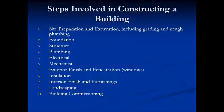Your electrical would be installed — meaning the wiring, the panels, etc. The mechanical systems, such as your heating and cooling. Then, after these, the exterior sheathing of the building — meaning the plywood or whatever is going to be used for the outside of the structure. You'd have the exterior finish and fenestration by way of windows, and you'd also be adding insulation in.